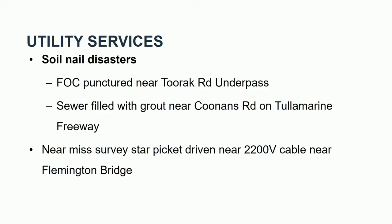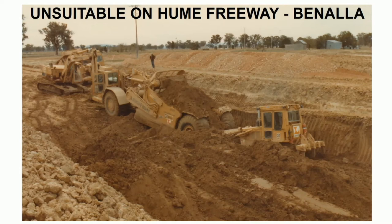For utility services — going through these DRUPTO events — I'll talk about soil nail disasters. A fibre optic cable was punctured at Turok Road underpass while drilling for batter support. Down on Coonins Road on the Tulla, we were drilling for shotcrete supporting the batters and punctured the sewer — the workers filled it with cement grout and kept pumping. There was also a near-miss where a steel survey picket was put in the ground near Flemington Bridge right next to a 2,200-volt cable.